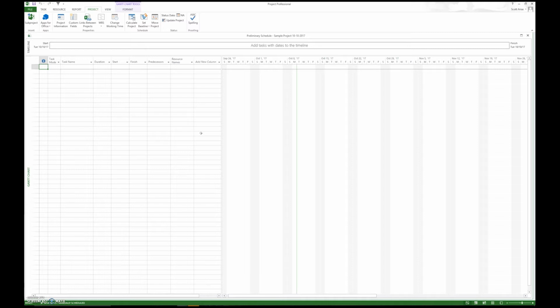Now, we can name it preliminary, proposed, for review, submitted for approval, the approved baseline, and then the schedule update. Those are the different items that we can consider naming our file as. So of course when we start, we're going to name it as a preliminary, and as we go through the sequence of getting it approved and updating it, we're going to change the name from preliminary to submitted for approval to approved baseline, and then ultimately to a schedule update. Always associate a date with each of the schedules.